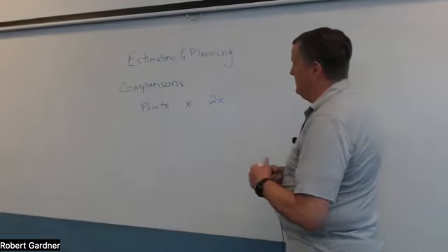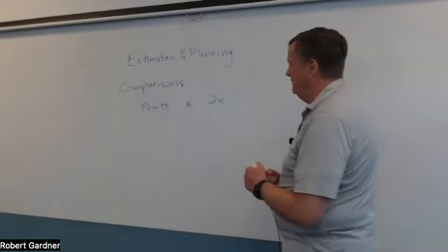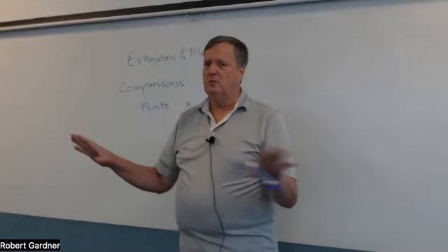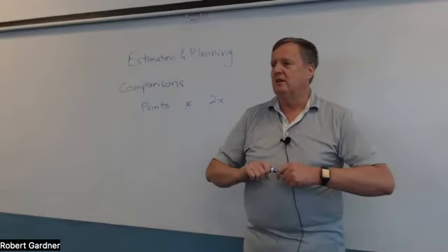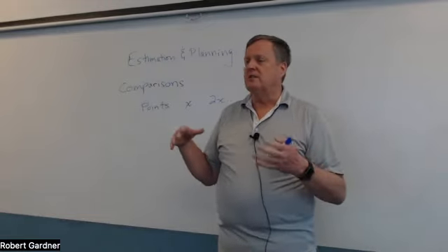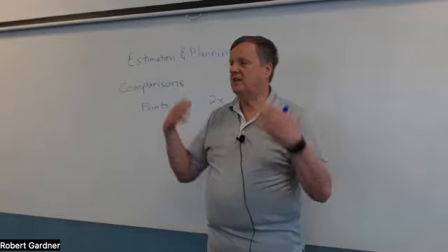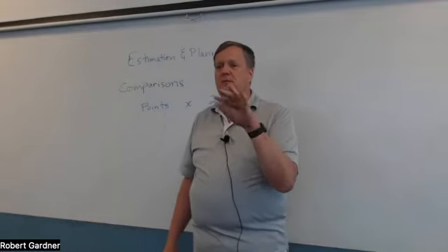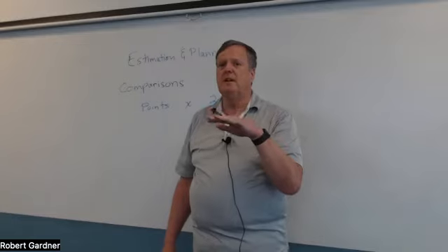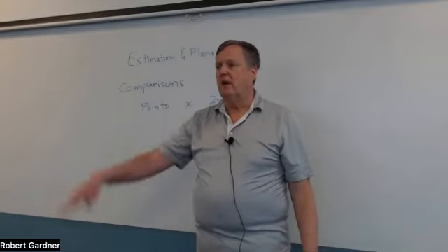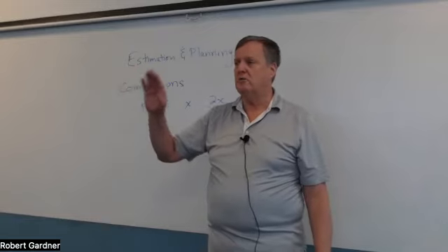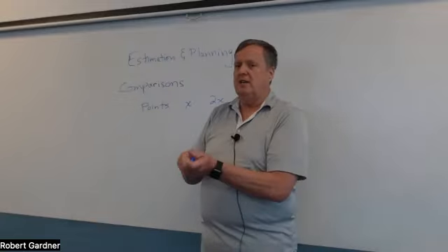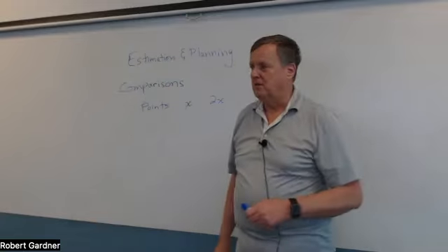Here's one of the best ways to calibrate and figure out what your points are. First of all, you have to keep a log of all the work that you've done. I recommend that you start at some point saying, okay, I'm going to take on a task, do a project, write it down. This is the task. Just put enough information in there that you'll be able to remember what it was. And then you track how many days it took. Calendar time. Don't track time I sat at the keyboard. You track calendar time. And you have a log of all of these tasks that you did and about how much calendar time they took.